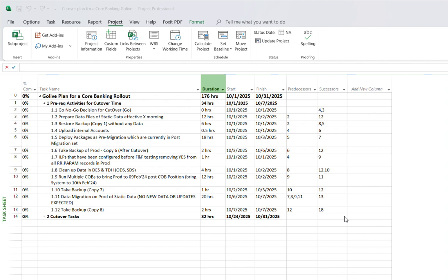Every time you change any date, hours, duration, or start/stop time, because of the predecessors present in the plan, the whole plan will shift and you will have the exact correct projections. Instead, doing the same thing in an Excel sheet means changing all the dates, hours, and durations every time you update a single cell.